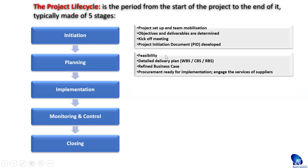Hence the need sometimes for feasibility as part of your planning. In fact, the planning stage is also sometimes called, depending on the organization, a feasibility stage. You want to deliver your project plan in this stage, which will clearly outline your work breakdown structure, cost breakdown structure, and resource breakdown structure. This gives you near-accurate instructions to refine a business case, built around this granular level of detail, providing core direction and focus with a clear justification and information around the benefits and the costs.